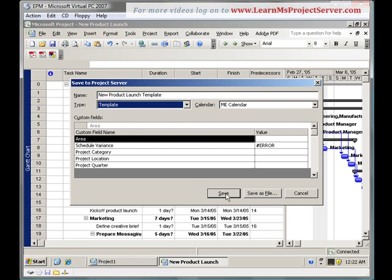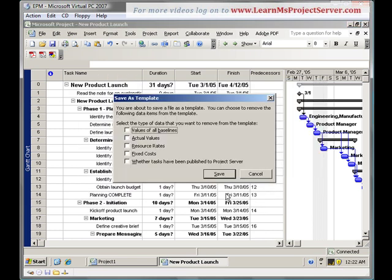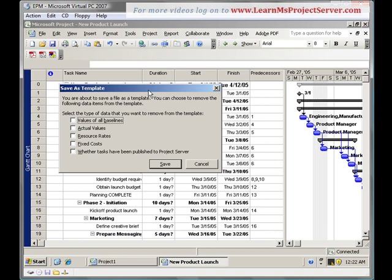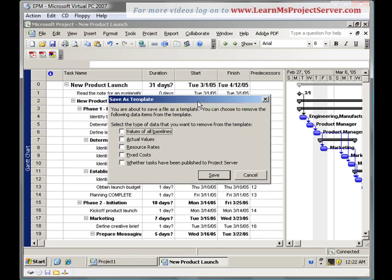Now, if I want to save this as a template, there's a small dialog box informing me that I am about to save a file as a template. You can choose to remove the following data items from the template. What are the type of information that I can remove for this template? I don't want the project managers to come up and do some house training stuff on this template. So, I can take off all those values that I don't need to be in the template. The type of information that I can take off from this template is the baselines, the values of all baselines, the actual values, the resource rates, the fixed costs, and the tasks that have been published to the product server. I can check this and say that I won't remove this from the template.